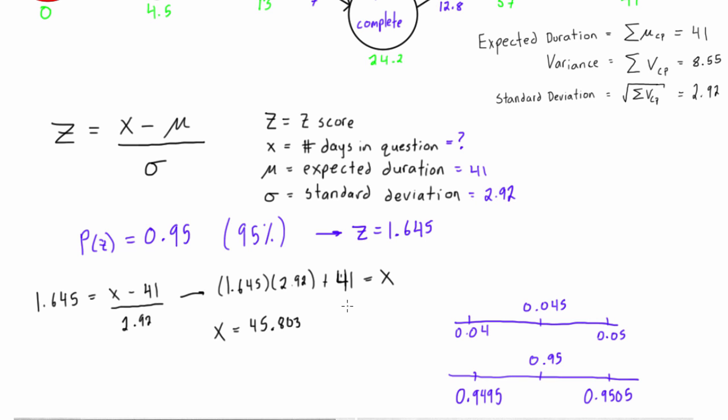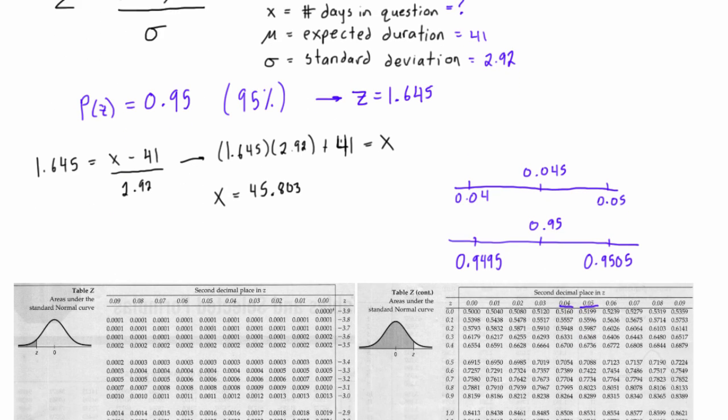So the original question was what is the estimated project completion date with at least a 95% confidence level? Well, it's 45.803 days or more, and the reason that we say or more at the end...